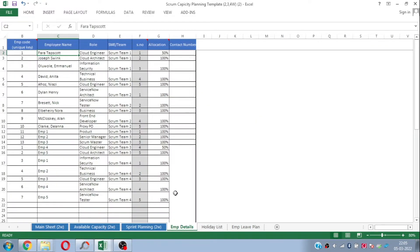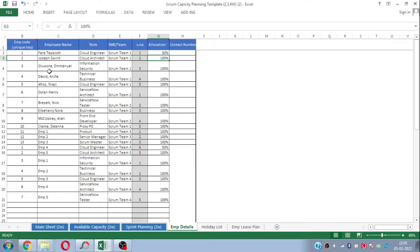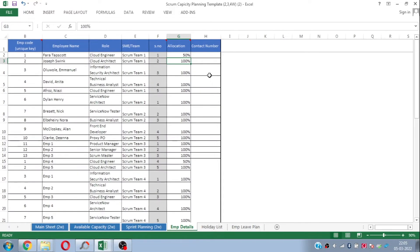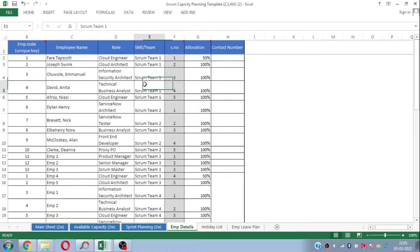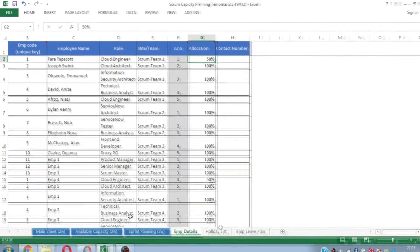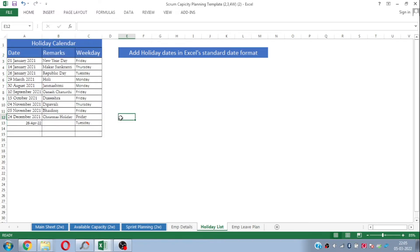The employee details sheet is where you need to plot your scrum team. You just need to put their employee names, their roles, which scrum team they belong to, the serial number, and of course the location percentage. The location percentage is basically for shared resources — for example, if any of your team members in a particular scrum team is working as a shared resource, you can change the location percentage accordingly, and this will be considered while doing capacity planning.